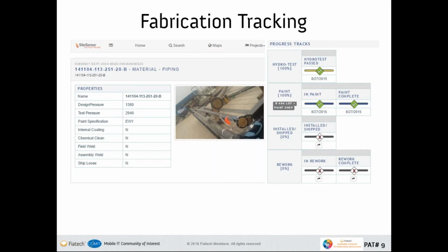So to do that, they actually just open the app, they hit the progress step, they enter the date complete, and because they are logged into the device as a user, it also tracks who did that test, and when they did that test as well. It's a very traceable, auditable system for knowing who did what and when.